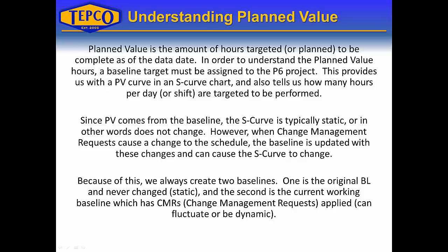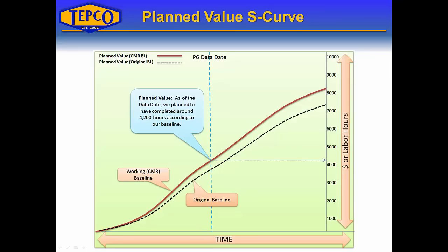Since the planned value comes from the baseline, the S-curve is typically static — it does not change. But when change management requests cause a change to the schedule, the baseline should be updated, and it can cause the S-curve to change for the planned value. Because of this, we always create two baselines: one is the original baseline, which is never changed, and the second is a working baseline — sometimes called a change management request baseline — which gets updated with added or removed work.